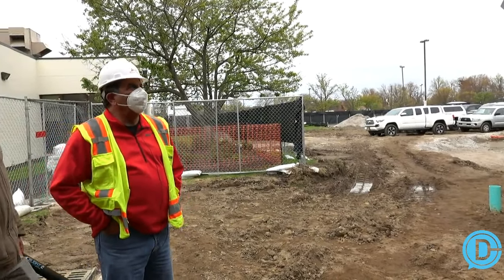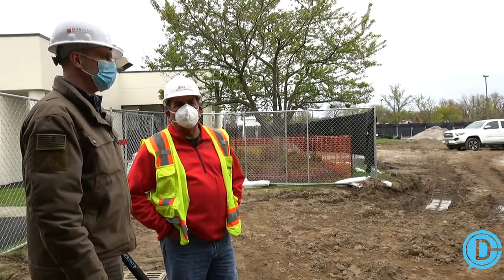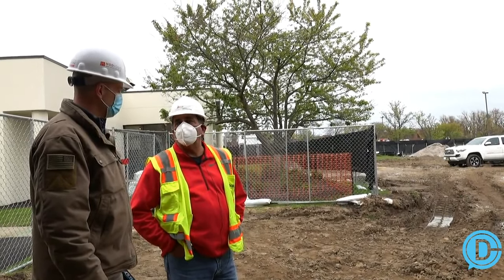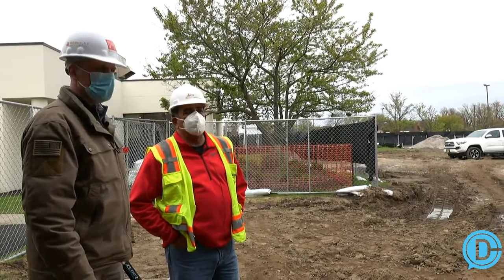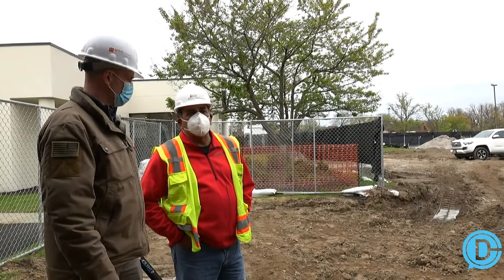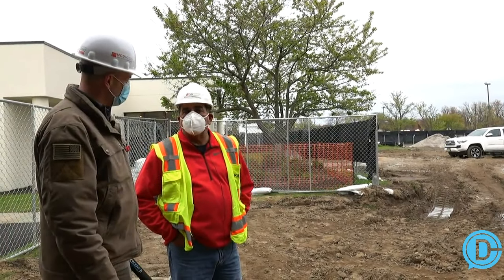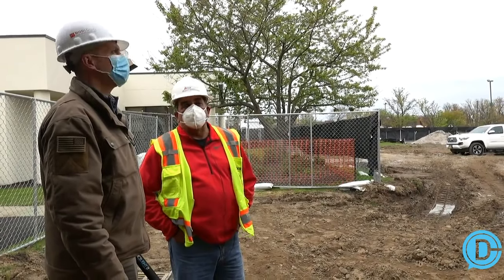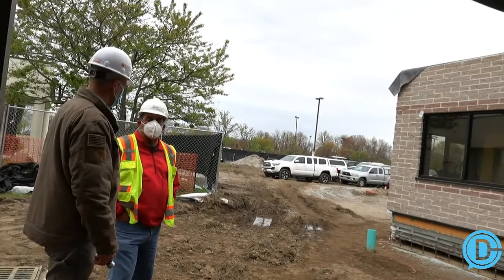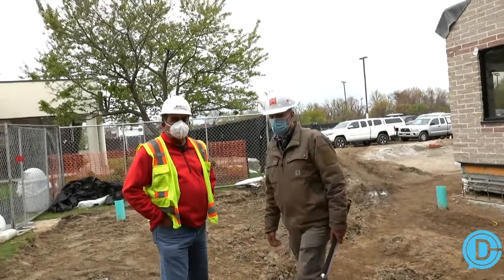On this project, we'll do the same thing we do on all of them. We do a post-project review. Lessons learned: what could we have done differently, what should we have done differently, what could we have added? We do that on every project. We'll sit with MODLOGIQ, probably have a meeting up here sometime in June. We'll sit around the nurses' station and just talk. What did we see on their end? What did they see on our end? We constantly review projects to see how we can do better. That's the only way to do it, and the only way to grow.